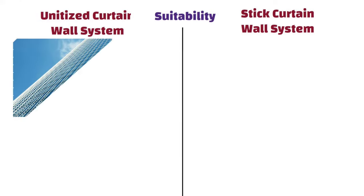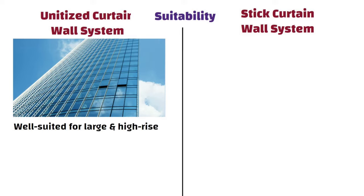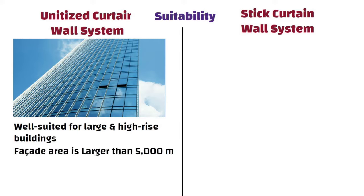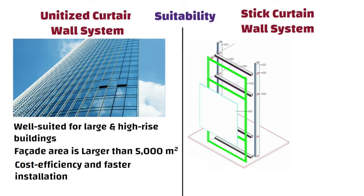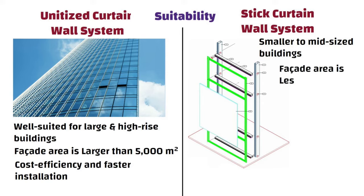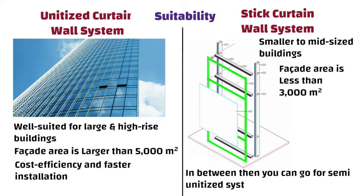Suitability: Unitized systems are well suited for large and high-rise buildings because they can be assembled off-site and installed quickly. If the facade area is larger than 5000 square meters, then choose a unitized system for cost efficiency and faster installation. Stick systems are often used in smaller to mid-size buildings. If the facade area is less than 3000 square meters, opt for the stick curtain wall system. If the area is in between, then you can go for a semi-unitized system.